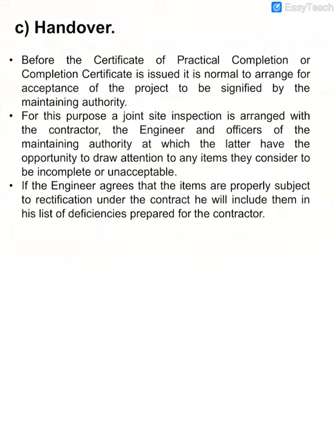So before they issue the certificate, they have to call the maintenance authority, because once the project is completed, the maintenance authority will take over the project and do all the maintenance work.